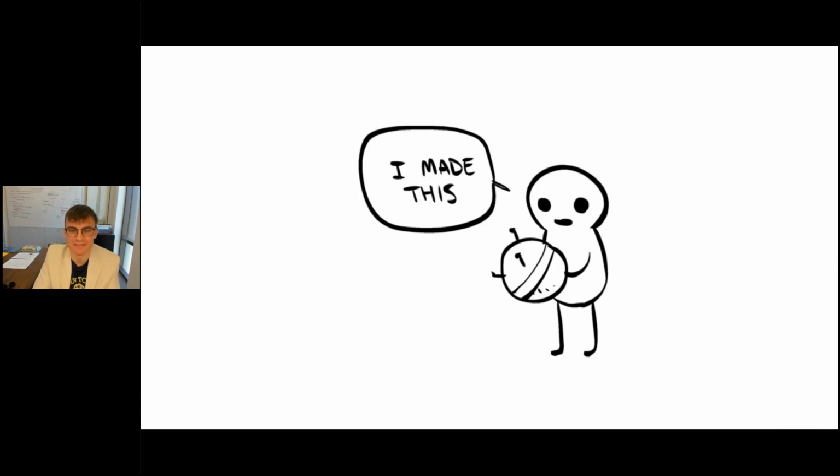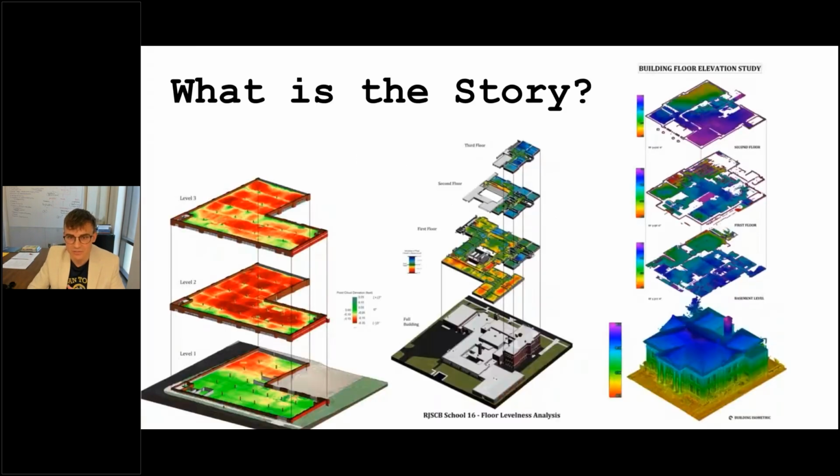But what do you actually give the client? It's almost never the case that the client's going to dive into the nitty-gritty. In most cases, they're going to need some hand-holding. So accompany all the files with a summary report that goes through all the data being handed over. The final deliverable should be a combination of things: graphs, images, animations, spreadsheets, so the client has the option of consuming the information whichever way they prefer.